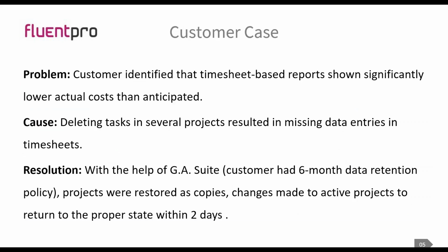An example of a customer case that we've helped with is that if there is timesheet-based reporting and all the data inside the PWA is interconnected, so when the timesheets are populated, the data goes to the project actuals, and when the reports are generated, they are based on those actual costs.